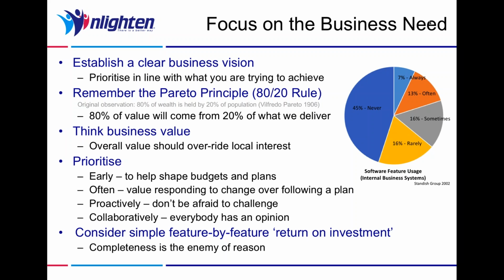It's just a case of doing enough to allow the relative value of our features to be understood. Having done that, we've got a rough idea of value, we've got a rough idea of effort associated with building that feature or making that feature a reality. Then we've got this idea of a very lightweight return on investment concept in order to help us prioritize. So on to MoSCoW proper now.